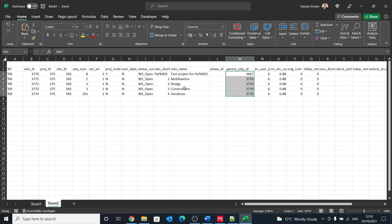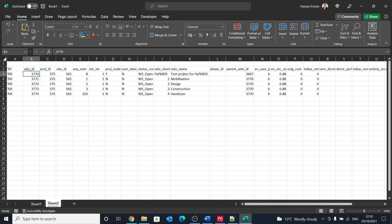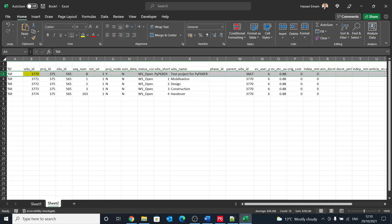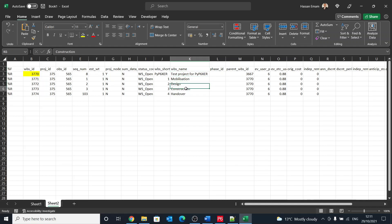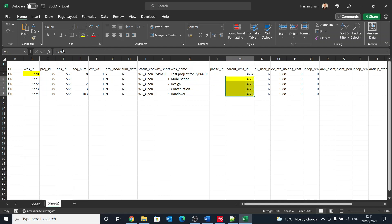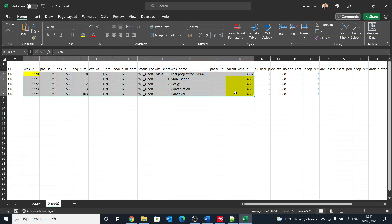Basically, say that the first one it's not in the list, so that will be the project reference. But the second one here it is referring to 3770, which is that record. So this will be mobilization is under test project, design is under test project, construction same, and handover is the same. So they are all referring to this particular, and that's how the hierarchy is created in P6.